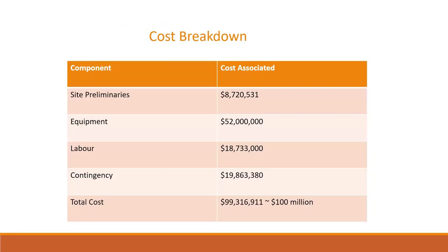The cost estimate includes resources needed, such as labor, equipment, remediation technique, and contingency costs to approximate a budget that can be used for the conceptual design stage of this project. It should be noted that while the costing has been estimated with a great degree of detail, it should not be taken as a final budget and needs to be updated during the detailed design and procurement stages of the project.